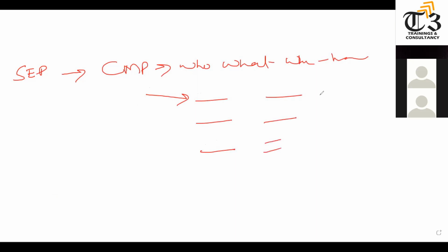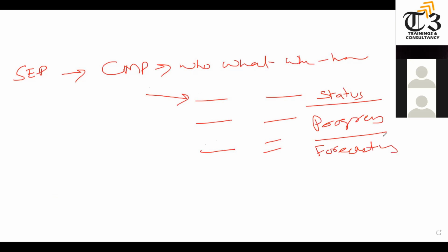So you will send this information based on the status report, which contains a snapshot of the scope, schedule, cost, and quality. It could be the progress report, which is like total percentage. It could be the forecasting reports: ETC, EAC, and TCPI. Or it could be the variance reports. So this was our communication and stakeholder engagement, how to do it. In procurements, we have already explained it, so this is a small revision of it.